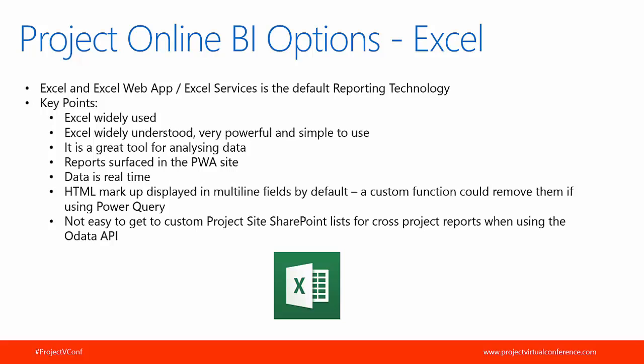The data's real time. You can refresh those reports and pull through the latest data that's been published for the project or resources. One thing to note is that by default, the HTML markup that you see in multi-line fields is displayed, but you can remove that with an add-in for Excel called Power Query that enables you to use some functions and actually strip those out to make the text more readable.